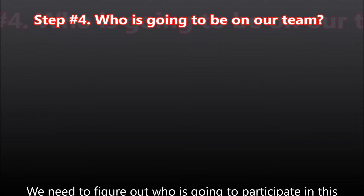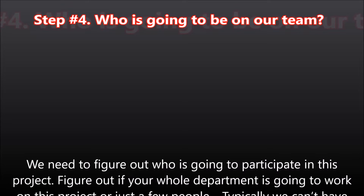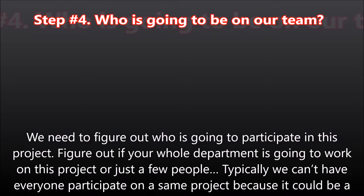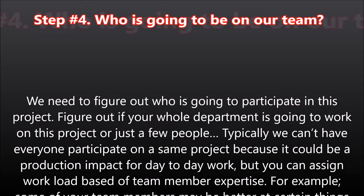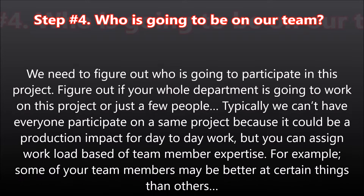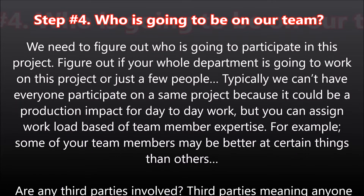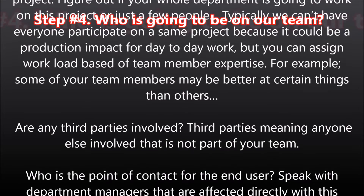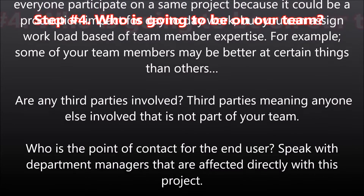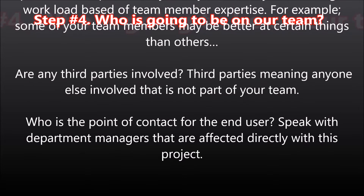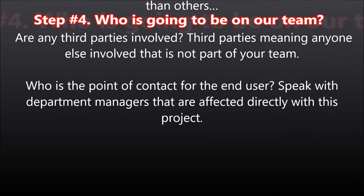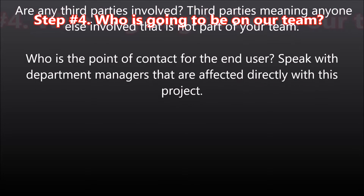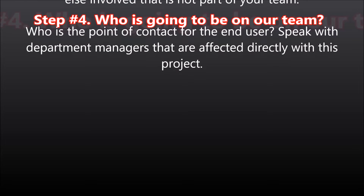Step number four: who is going to be on our team? We need to figure out who is going to participate in this project. Determine if your whole department will work on it or just a few people. Typically we can't have everyone participate because it could impact day-to-day work, but you can assign workload based on team member expertise. Are any third parties involved — anyone not part of your team? Also identify who is the point of contact for the end user, and speak with department managers directly affected by this project.